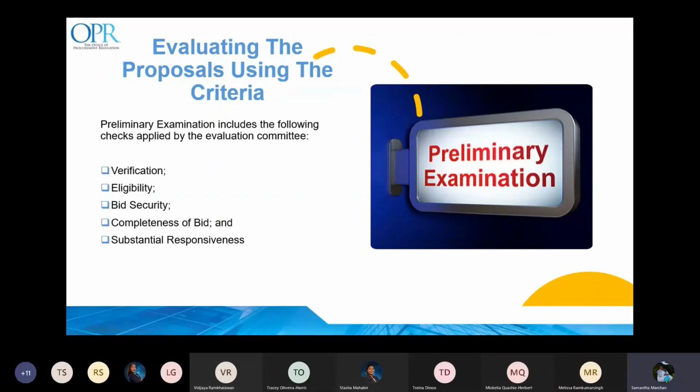Simple omissions or mistakes caused by human error should not be grounds for rejection of a bid. However, an omission that affects the validity of the bid itself, such as signatures, must not be in question. All copies of the bid should be compared to the original, and in case of discrepancies, the original shall be taken into account, and the fact of the discrepancy should be stated in the evaluation report.